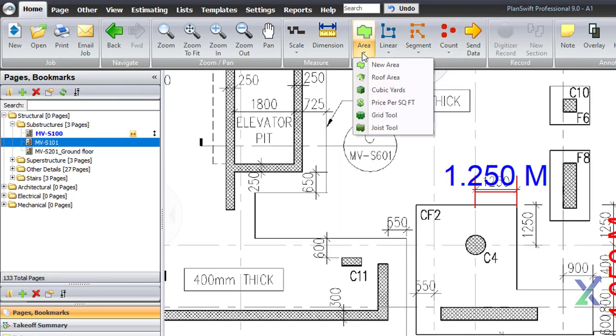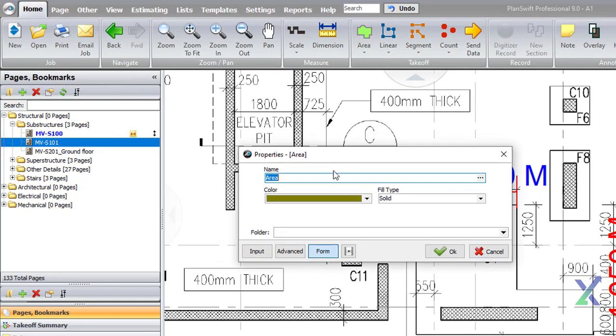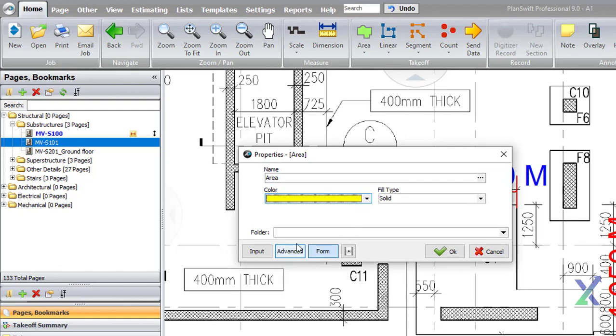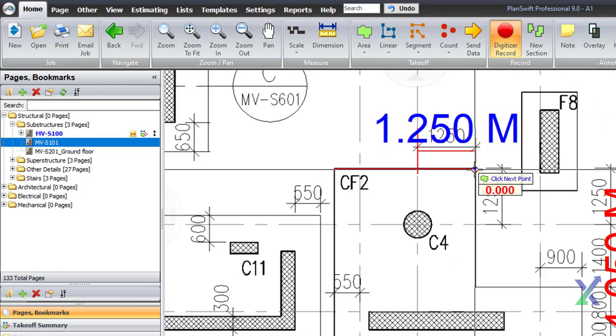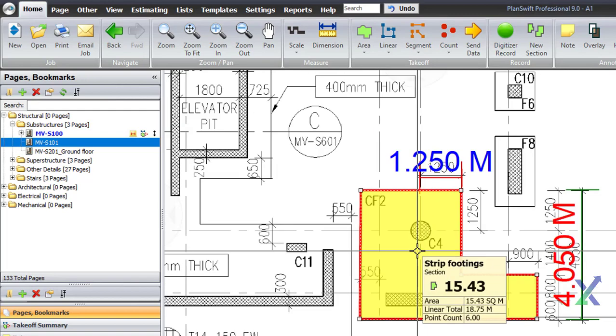Using the Area tool, add an estimate for strip footings. Select each corner of the footings while holding down the Shift key.